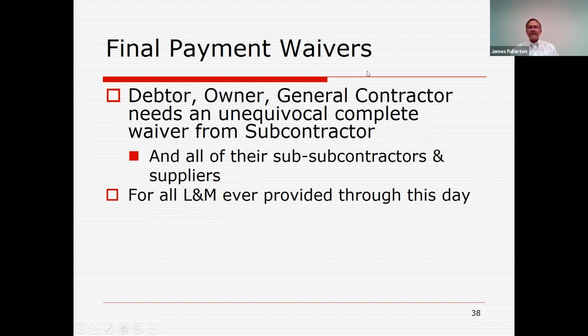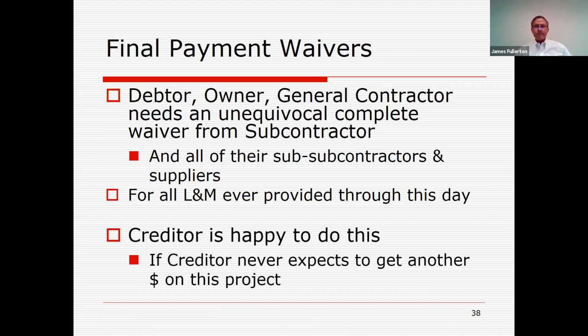Final waivers are a very different situation. And some people need to hear this. If you are really receiving final payment, if they're about to give you final payment and you never expect to receive another dollar off of this project, then you don't care how the waiver reads. You should review it and make sure you're not conveying your home or your vacation home in it. But generally, you don't care how the waiver is worded if you know you're done. It is a final waiver.